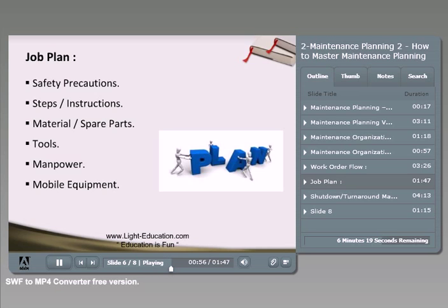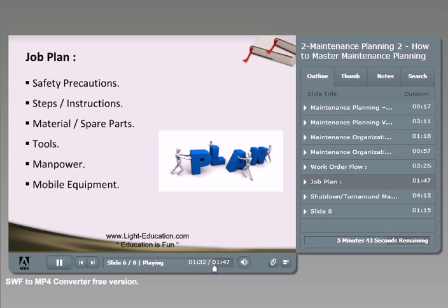The third part is the materials or spare parts — these need to be ready and captured in the job plan. Next is tools: normal hand tools or special tools like a grinding machine, welding machine, or cutting torch. Then manpower: how many people, helpers, welders, fitters, riggers, and so on. Finally, mobile equipment: do we need a crane, and what is its capacity? Do we need a sky lift, scissor lift, or forklift? All mobile equipment should be clearly stated in the job plan.